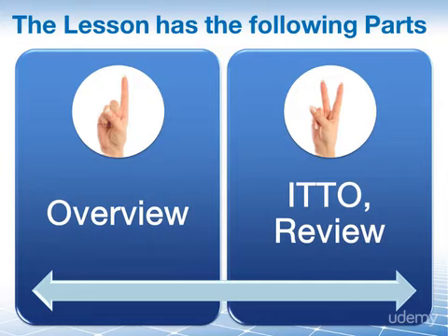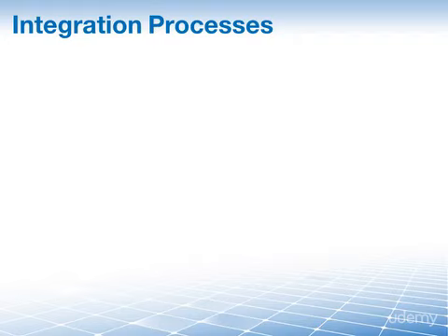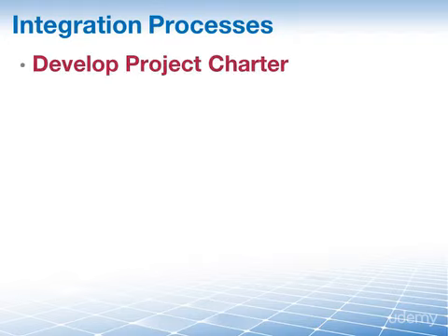And now, let's see how this turns into actual work for us as project managers. Every project is authorized via a charter. No matter how formal or informal it may be, Develop Project Charter is the first process we go through. This is the process of developing a document that formally authorizes the existence of a project and provides the project manager, you, me, with the authority to apply organizational resources to project activities.